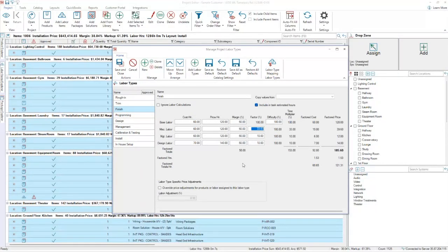I ask customers a lot, what does your labor efficiency look like? How many hours a day of actual efficient production work do you expect from a typical technician? Sometimes I hear 7 hours or 6 hours, depending on the location. If it's a customer working in Manhattan, sometimes they're saying 4 hours. There's lots of traffic, lots of driving, difficulty parking.